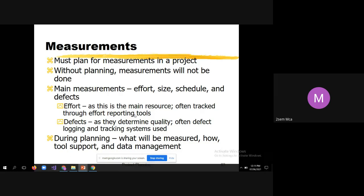Defects determine quality — fewer defects means higher quality software. Defect logging and tracking systems are often used; examples include project management tools like JIRA, Confluence, and Redmine, as well as Bugzilla, which is an ideal tool for defect tracking. During planning, it must be determined what will be measured, how it will be measured, what tool support is needed, and how to manage the data.